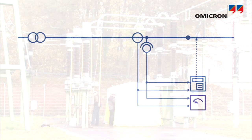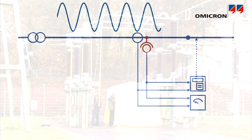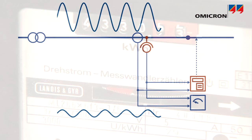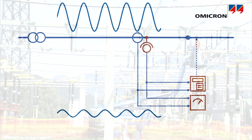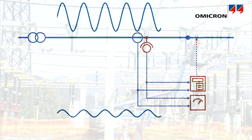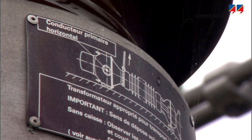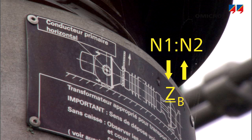Potential or voltage transformers, or VTs, have to transform primary voltages into levels that can be applied to control, protection, and metering systems, with sufficient accuracy and correct polarity. Thus, during the commissioning or refurbishment of a substation, testing a VT includes checking its ratio and polarity, and measuring its burden.